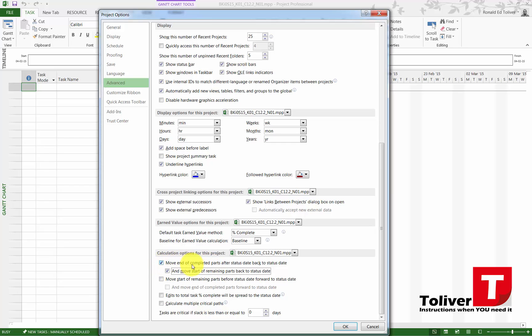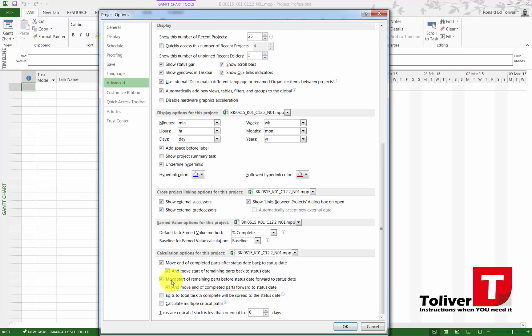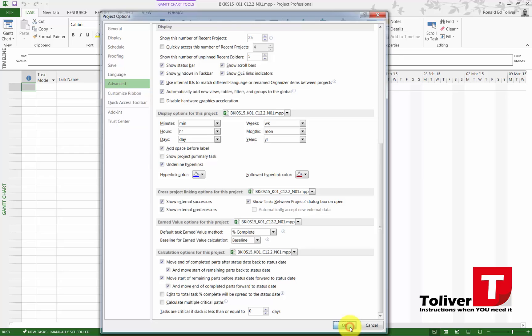And the same thing with this one: Move Start of Remaining Parts Before Status Date Forward to Status Date. Activate these two: Move End of Completed Parts Forward to Status Date.